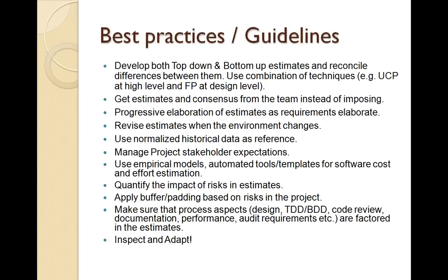Now let's go through some of the best practices or guidelines or inputs on how we can build good estimates, what we can do for the estimation techniques. What practically we can use is we can develop both top-down and bottom-up estimates. If the project is a high-risk project, and it requires very detailed estimates or estimates that we can rely on, then we can use a combination of top-down and bottom-up estimates. Or we can have multiple estimation techniques that can be used to get more coarse-grained or more detailed estimates as required. For example, initially when we have the use cases developed, we can have use case based estimation at a very high level. And when we go to the design level, we know the inputs and outputs and all the data of the system. At that time, we can have function point based estimates. So we can have a combination of that.